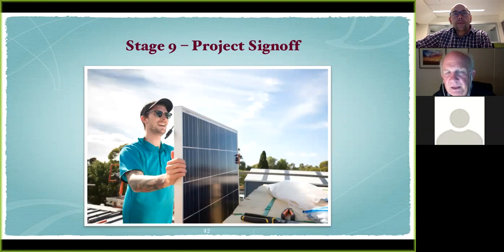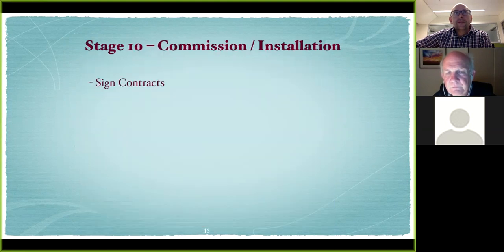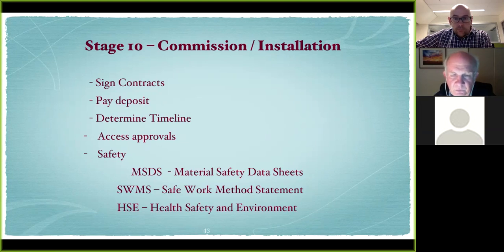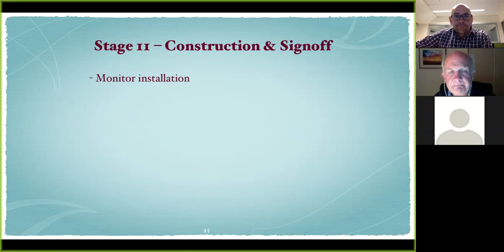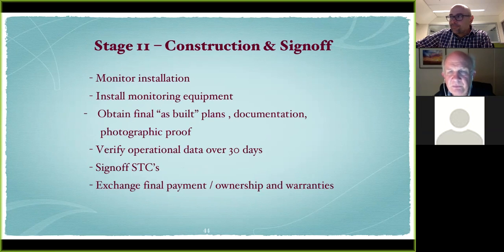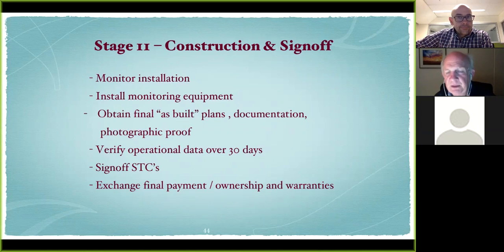Then they got project sign off — they got the money and commissioned the project, signed the contracts, paid the deposit, and worked the timetable. For commercial sites there are quite a lot of technical requirements: material safety data sheets, SWMS, and health safety environment requirements. They're real sticklers for this — if anybody falls off the roof that's a big problem. They install their own monitoring gear, get final as-built plans, sign off on the small-scale technology certificates, and only award final payment and transfer ownership after verifying operation over up to 30 days. In the library they have a community dashboard displaying solar output so visitors can see the community's investment in action.